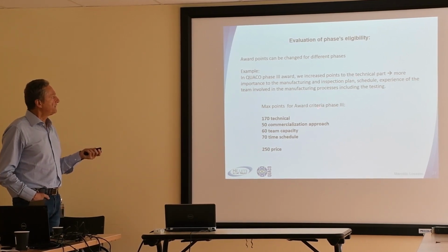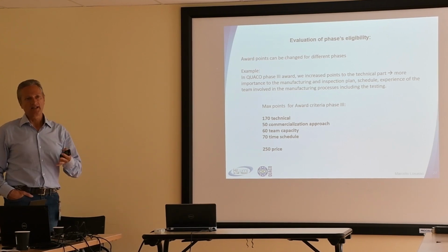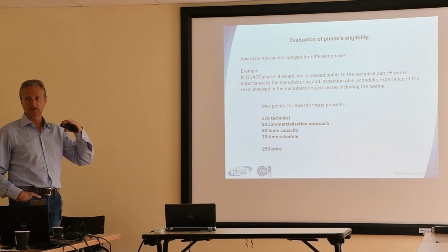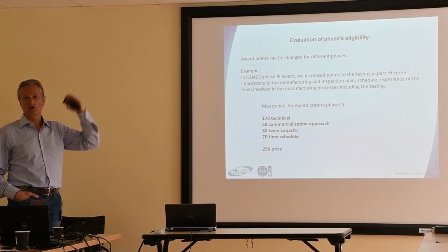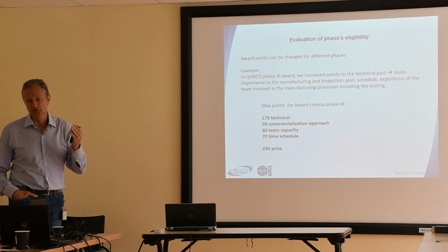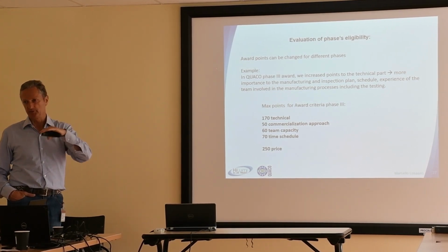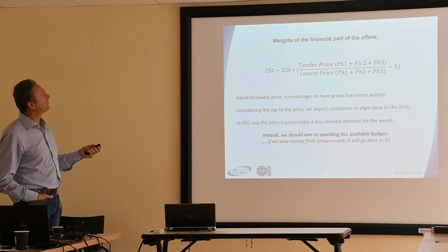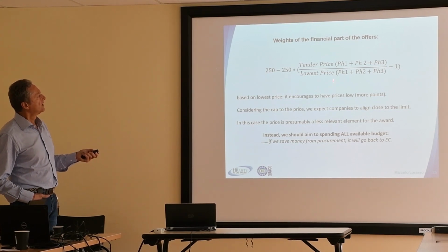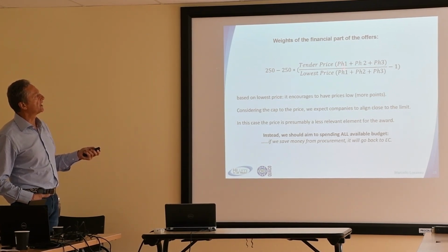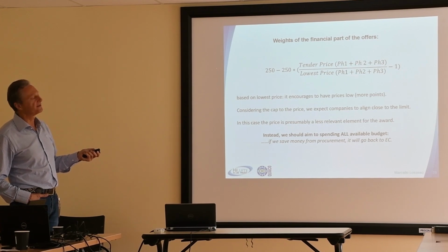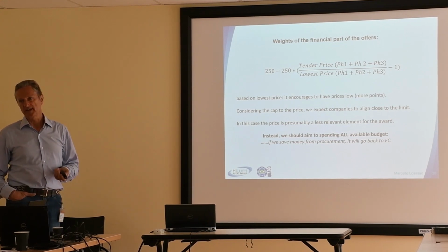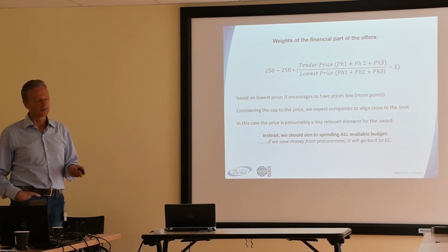Why? Because the financial part, there is not much competition about it. You have a budget fixed, and you say, well, if you go over this budget, you will be disqualified. So all the companies set themselves around that cap. That's the reality. So we gave the financial part of the offer a weight in a way to keep track of all the prices that they presented in the different phases.